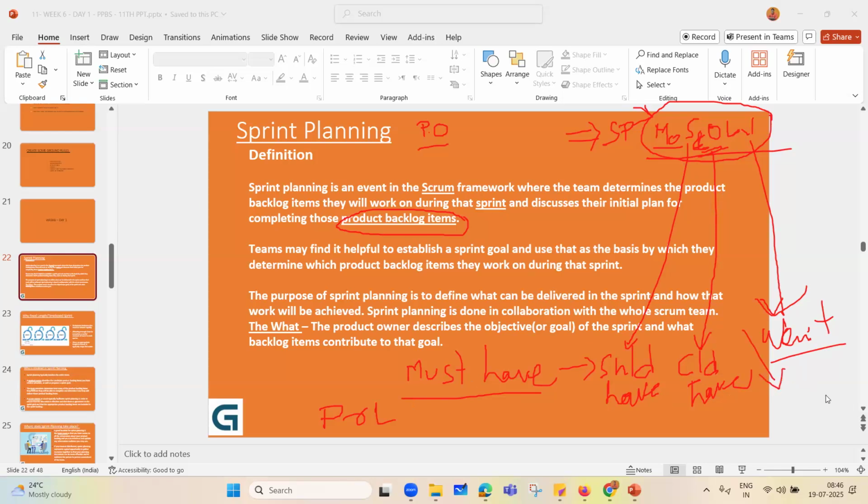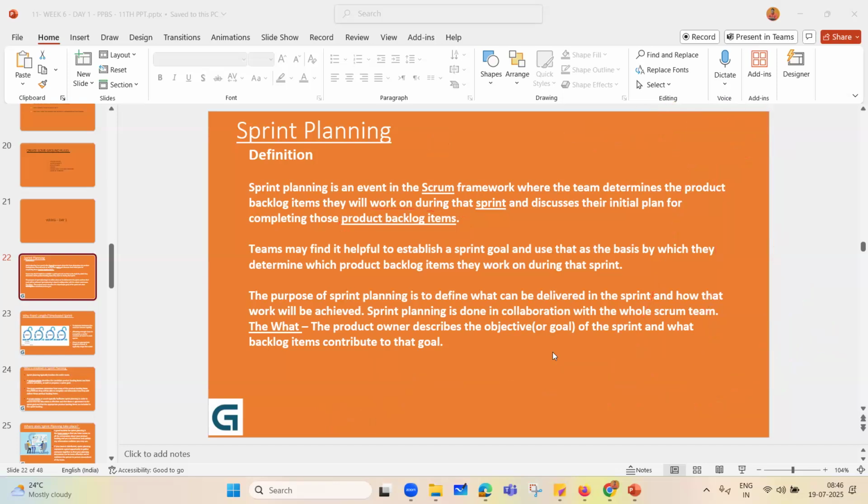You are clearly declaring that these are the features we are not going to work upon. Maybe due to some constraint, maybe it is not readiness, maybe compatibility, and there could be n number of reasons for not taking this up, or these are not the right requirements and came from assumption or guesswork. That's the reason you decided W for won't have. Clear, everyone? Yes, thank you.